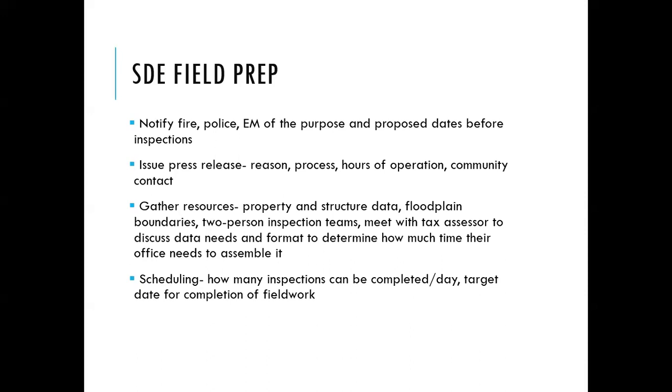Then you're setting that schedule: how many inspections can be completed per day, and what your target date is for completing that field work. FEMA says a residential assessment is typically 40 to 90 minutes, and non-residential can take longer, around 90 to 120 minutes. Of course, there's a lot of diversity between different types of structures, so it's just a rough estimate of how long each inspection should take.